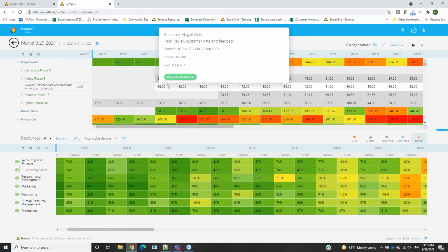One or a couple of replacements is fine, but if you plan on replacing all the information on a project, it may be better to do that directly within Tempus instead of the model itself, and then have that data brought back into the model, just to save yourself a little bit of time instead of making those changes essentially twice.